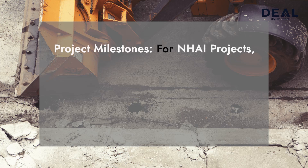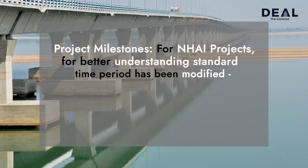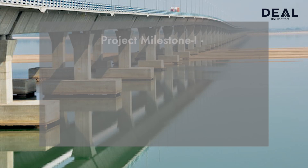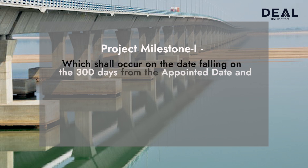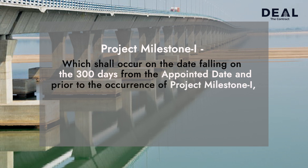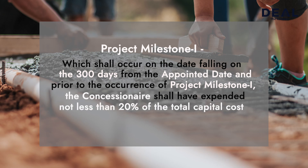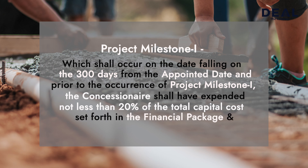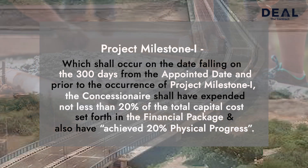Project milestones for NHI HAM projects — for better understanding, the standard time period has been modified. Project Milestone 1 shall occur on the date falling on the 300th day from the appointed date. Prior to the occurrence of Project Milestone 1, the concessionaire shall have expended not less than 20% of the total capital cost set forth in the financial package and also have achieved 20% of physical progress.